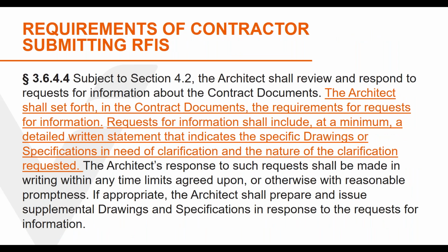In 2007, in response to efforts by contractors to pad their revenues by submitting a massive number of requests for information as a way to show the documents were insufficient to allow construction as intended, this language was added. By requiring a special form that makes the contractor indicate exactly what information is needed and where the contractor looked to find the information, the design firm is protected from having to respond to unnecessary requests.